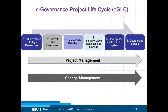We move on to looking at what is the e-governance project life cycle. How is it different from our typical SDLC or our typical project life cycle? One of the things we see in this cycle is that e-governance projects look beyond the typical project management phases. We have a start and an end which comes after implementation, but in e-governance, post-implementation becomes more critical — that is the operation and maintenance phase, where we look at sustainability and enhancements of existing services and bringing in new services.